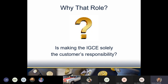If you can find in the regulations where your CO is supposed to write IGCEs, I'll be surprised. That's not to say a CO doesn't sometimes take on some role — when I was a CO I'd often get unintelligible submissions and had to make it work. But that's where it's incumbent on us to give them material so good that they don't have to take extra time. The IGCE is just as critical in defining the requirement as writing the PWS, because while the Performance Work Statement states the specifics of the requirement, the IGCE gives us the scale of the need.